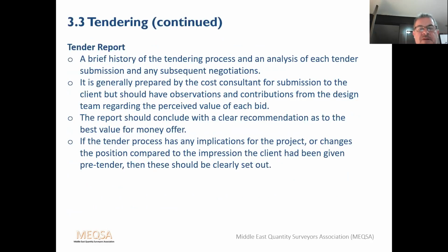Tender report. After completion of the tender analysis, the QS will prepare the tender report. This should include a brief history of the tendering process, an analysis of each tender submission, and any subsequent negotiations.